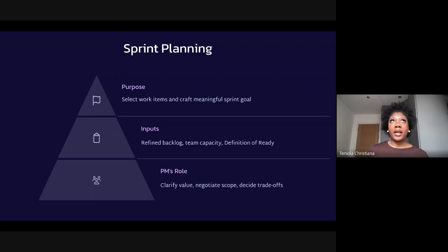This session really depends on the size of your team, and on the complexity of your product, as in the entire product offering that you work on. But for a lot of teams, it ranges from about an hour to 2 hours. You may not always use that allotted time, but it is a set meeting. Again, this will also depend on how frequently you do your sprints. Every company varies. Ideally, you should have a 2-week sprint. It really depends on the complexity of the product that you're working on.